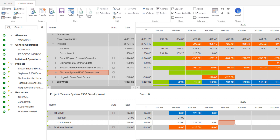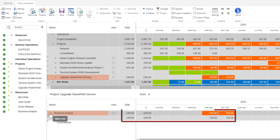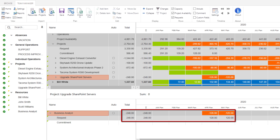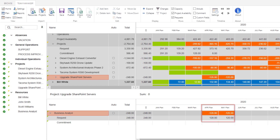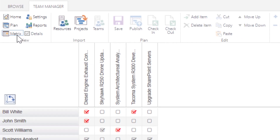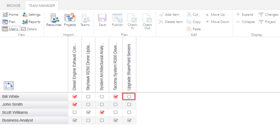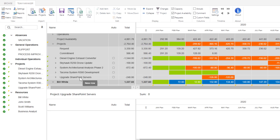If you are using PPM, you can publish this information back to the project manager, as I will show you later. We also have a request from the Upgrade SharePoint Services project. When we selected it, we noticed that Business Analyst is requested for a total of 248 hours over a two-month period, April and May. To assign someone from the team to this request, you can use the matrix icon and then use the checkbox to assign the resource to the projects. Red checkmarks indicate that there is an existing commitment in place. Those in gray are requests or have simply been assigned to the project but without any hours committed to them yet.